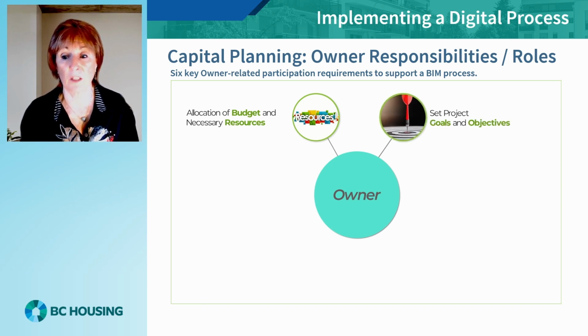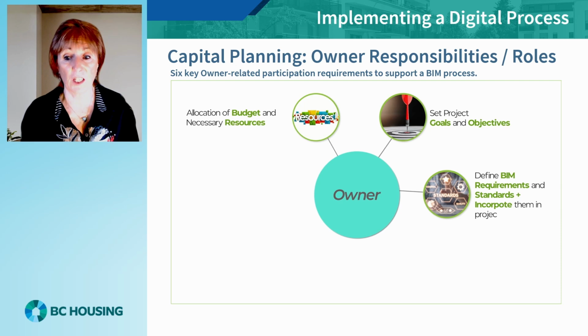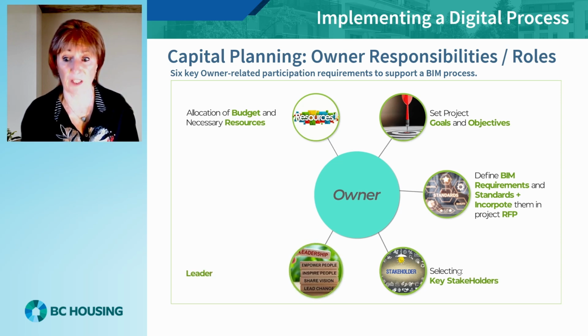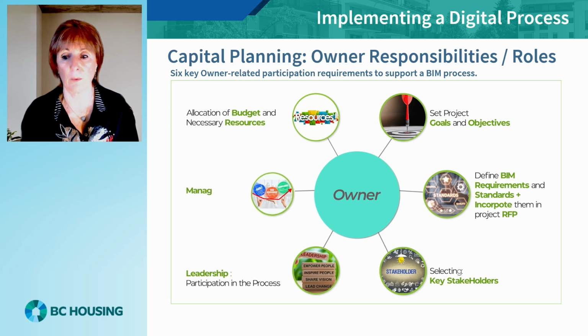A BIM requirement specification needs to be generated that identifies what these requirements are, articulates them clearly to the bidding teams so that they can be included in the RFP response. Ensure that when choosing the team, their BIM competency is considered as part of the selection criteria. BIM needs to be considered along with other criteria when selecting the teams.